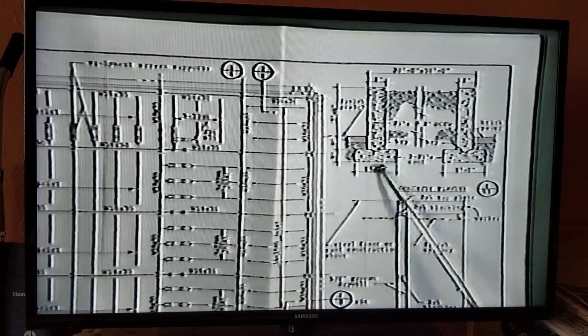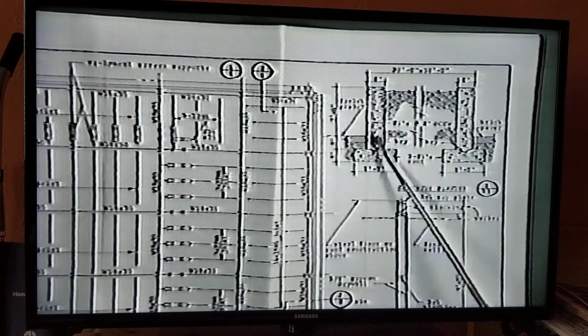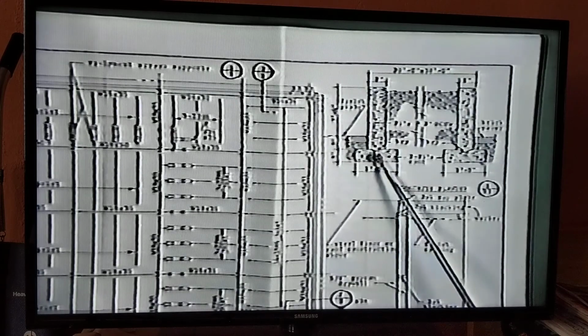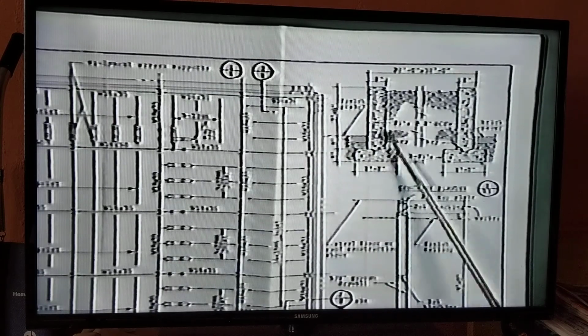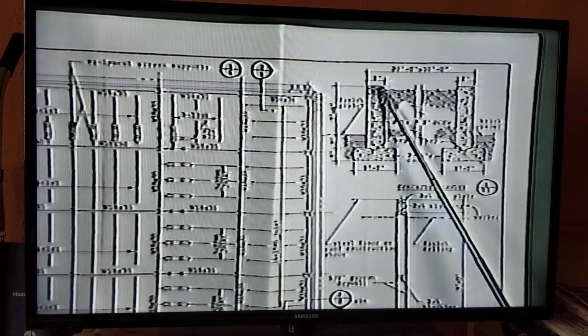Since the bottom of the footing itself is 1 foot 8 inches long, or 20 inches, to get from the center line out to the outer edge must be 10 inches. So if we took the 20-foot dimension and subtracted the 8 inches to get to the center, we would be looking at 19 feet 4 inches.